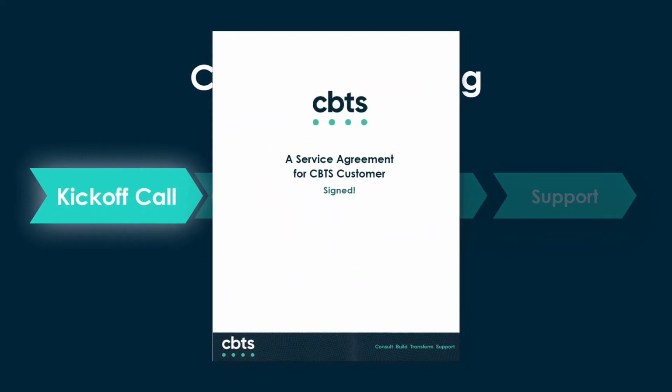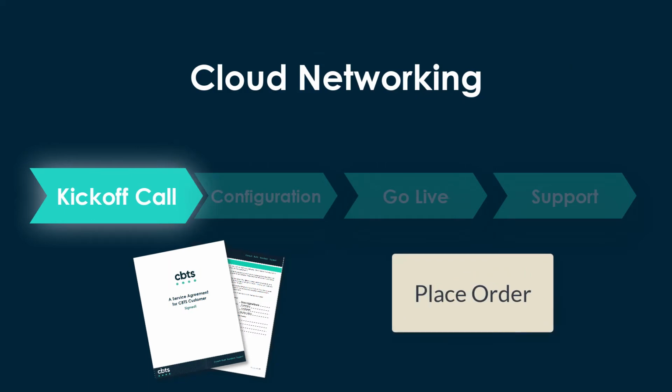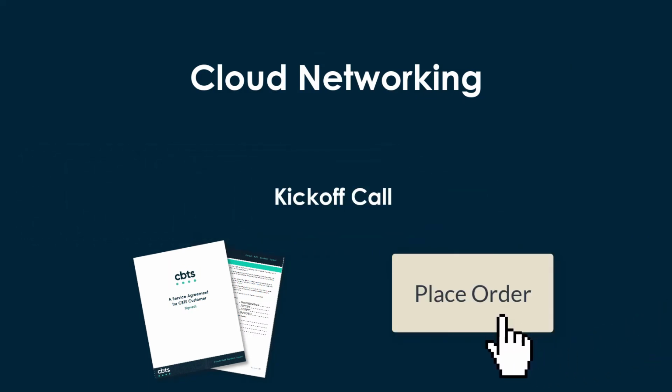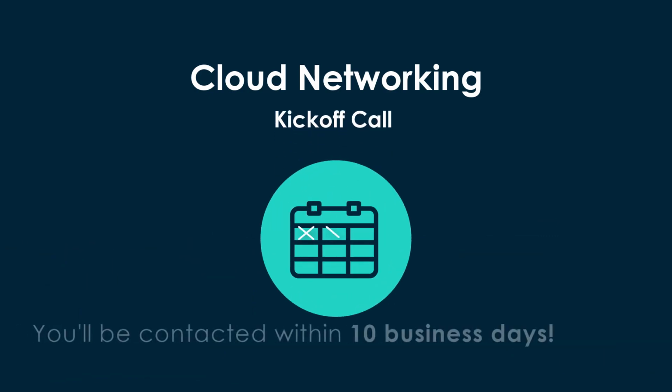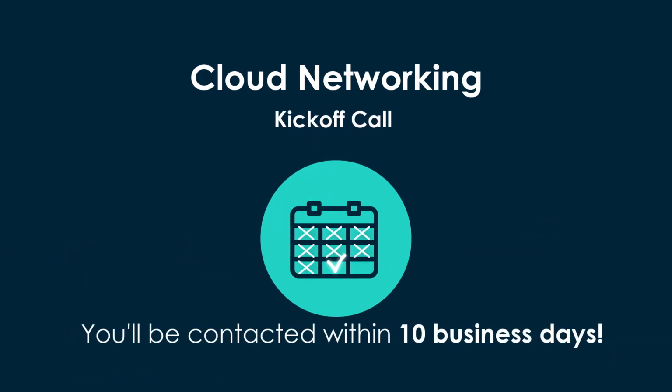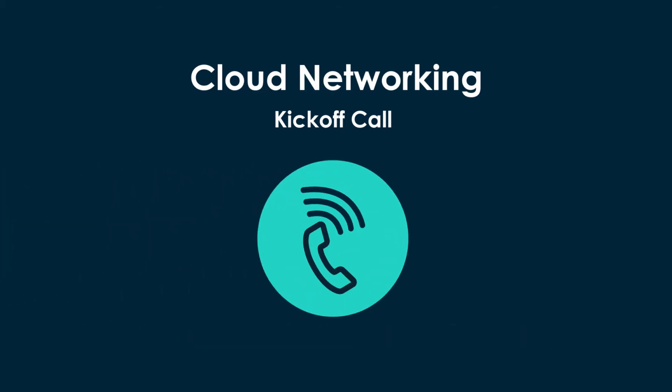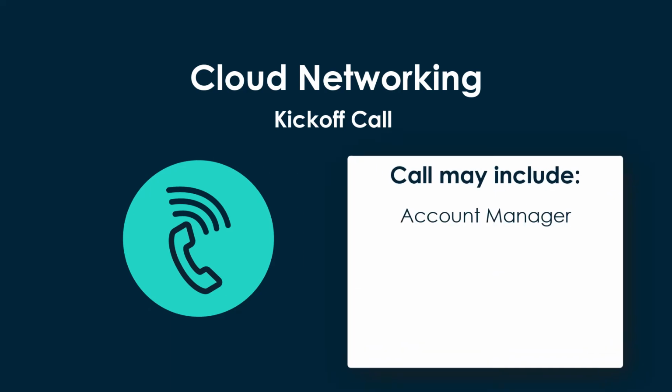Your service agreement has been signed and your CBTS account manager has submitted the order for your cloud networking solution. Next, you will be contacted to schedule your kickoff call within the next 10 business days. A CBTS project manager will be assigned and will contact you, the customer, to initiate this call. The call may also include your account manager, sales engineer, and data engineer.